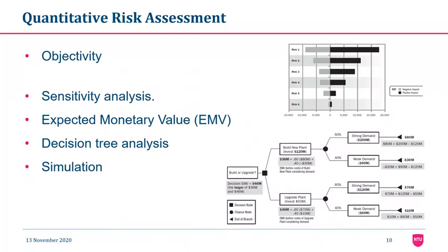But the figures for probability and impact are not based on expert judgment. It's based on statistical calculation, statistical data available for each risk. So it is more accurate and more objective. We also have decision tree analysis, as you can see in the figure below. Diagramming and calculation technique for evaluating the implication of a chain of multiple options in the presence of uncertainty.